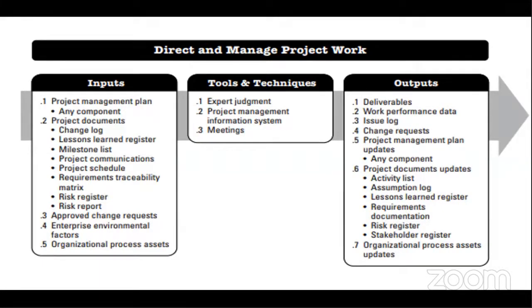Then we'll also have the risk report. The risk report is going to give us a breakdown of the characteristics of risks that were first identified. Did they come out? Did they not come out? How were they managed? What was the impact of those risks? We have a detailed report of all of those risks as to their implication on execution, that's implication on directing and managing the project. Then that will also improve our lessons learned. All of the things I'm saying here will improve the lessons learned from the team perspective.